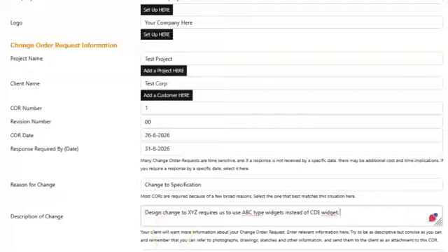This is just any kind of change, and very often it's not a change that seems huge. It's not a change that seems like it's a big money item, but even small changes, even just moving something from one place to another or changing the spec on something can have a big impact for ordering. It can have a big impact for productivity, for meeting your production schedules and all those kinds of things. So really, I feel like anything that changes on a job site will probably carry some kind of cost implication.